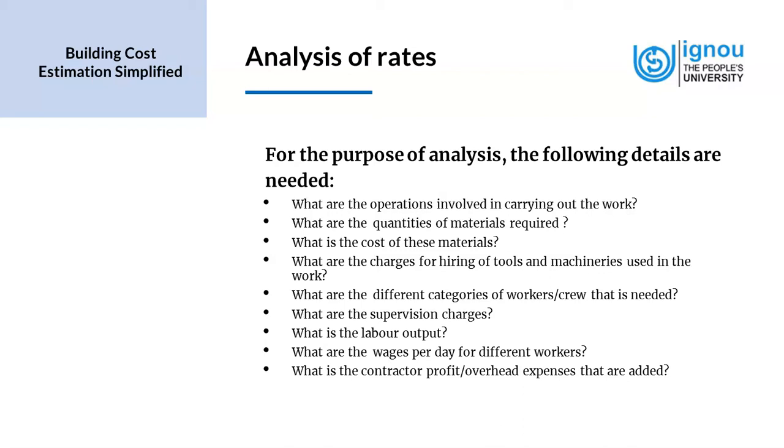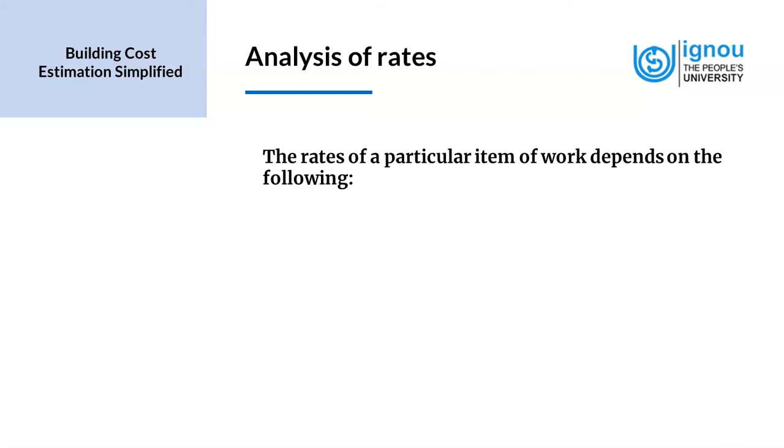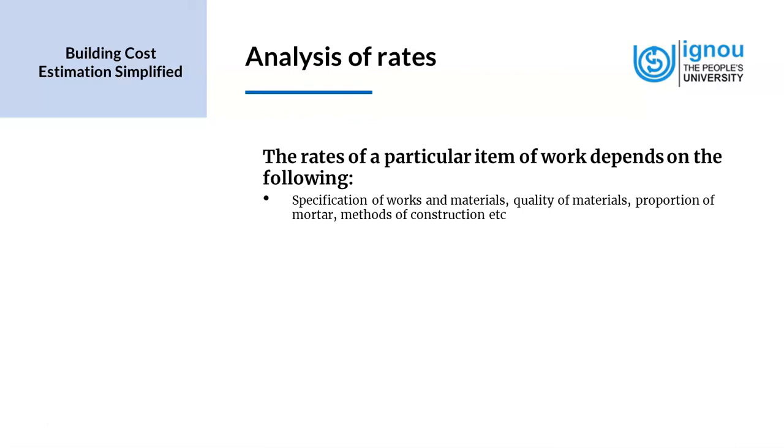Now, as we can glean from these, for the job of an estimation, the person who does an estimate, or for the purpose of analysis, it is very important to have an experience of actually what is happening on the site, a knowledge of construction practices. Experience of practical work is very important to do a thorough analysis of rates. Now, the rates of a particular item of work depends on a few factors. First of all, specification of works and materials, quality of materials, proportion of mortar, methods of construction, etc.